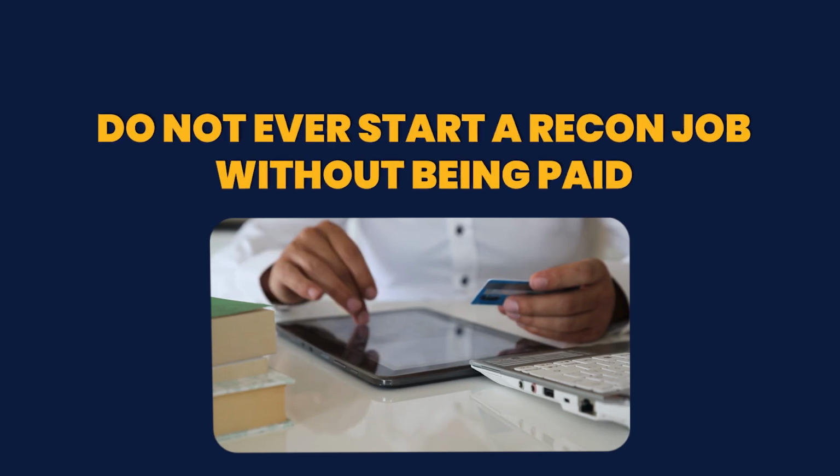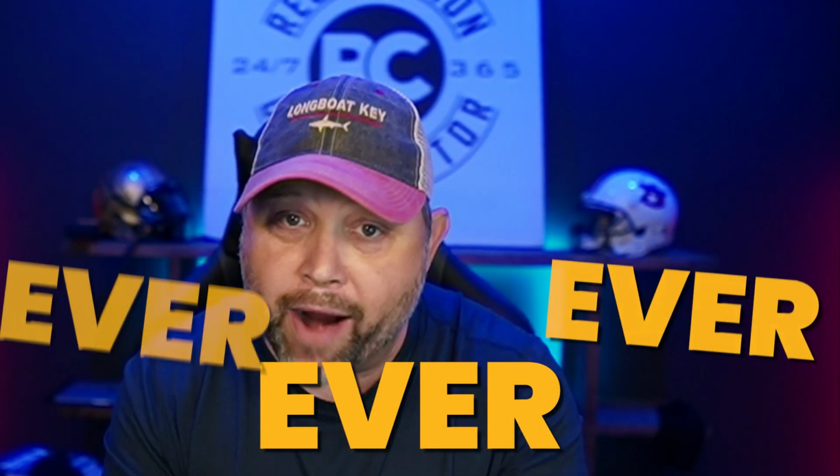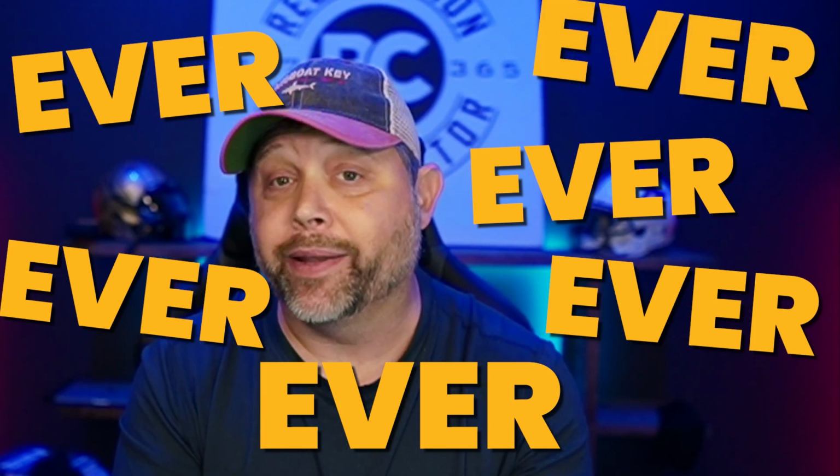And to be honest with you, we never had a problem with it. We never, ever had a problem with it. Always make sure that you're upfront on your cash though, okay? Another big boo-boo that's not in the scope of this video, I want to tell you why I got you here. Big mistake. Do not ever start a recon job without being paid. Okay? Do not ever start a recon job without getting paid.